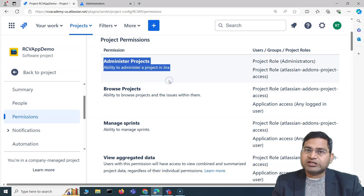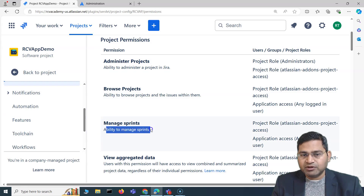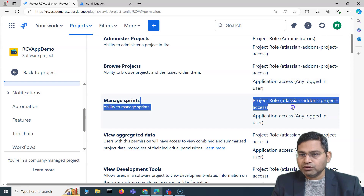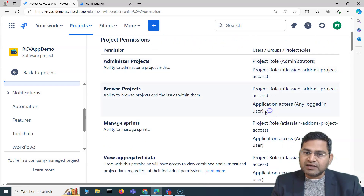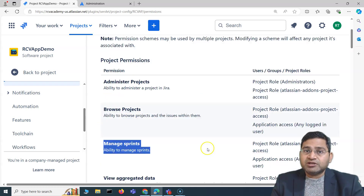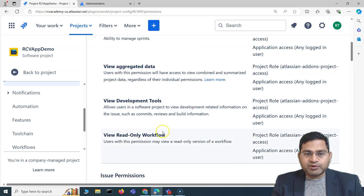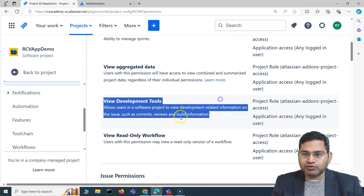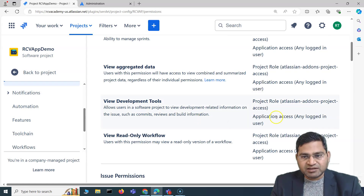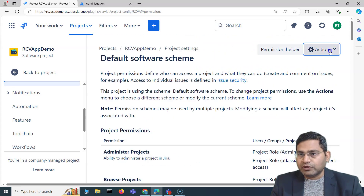The 'Administer Project' permission is for the project administrator — who is allowed to administer the RCV App Demo project. 'Manage Sprint' controls who can manage sprints. On the right-hand side you'll see different roles: Atlassian add-on, project access, application access, and any logged-in user. If you want to restrict sprint management, you can create a new group, add users to it, and associate it with that permission. You can control permissions through individual users, groups, or project roles. For example, for 'View Development Tool', you can add only a developers group so not every logged-in user has access.